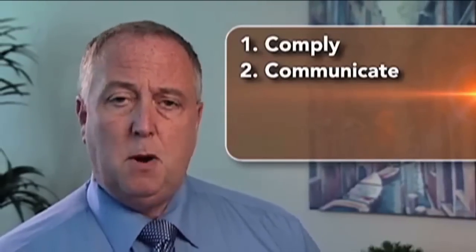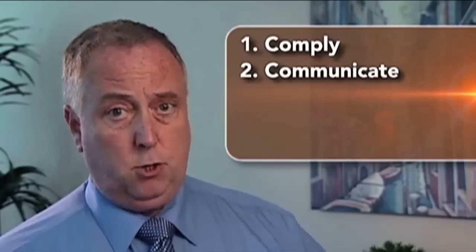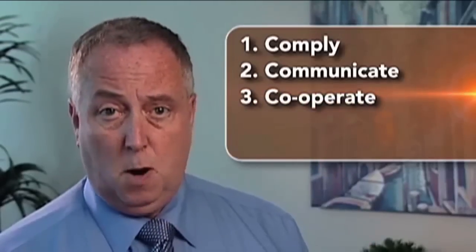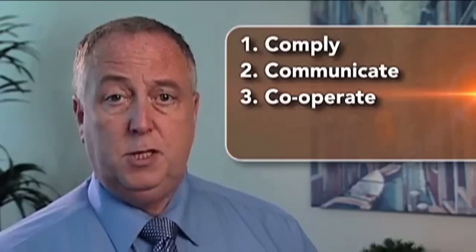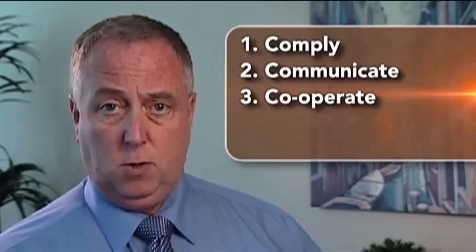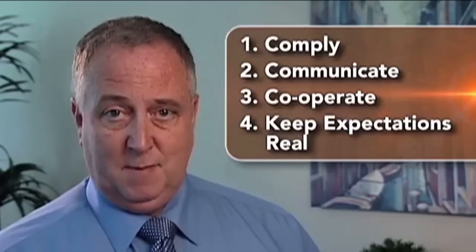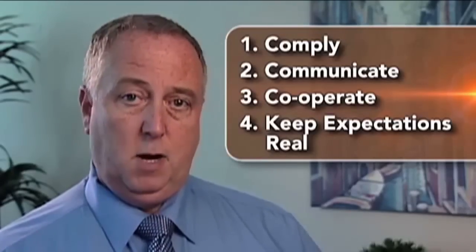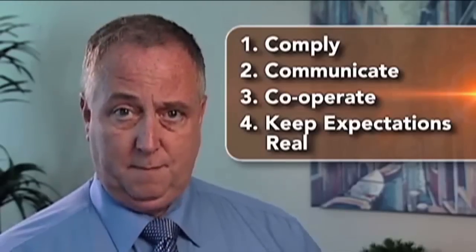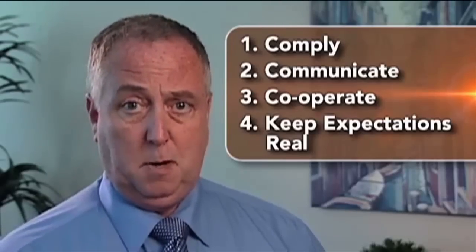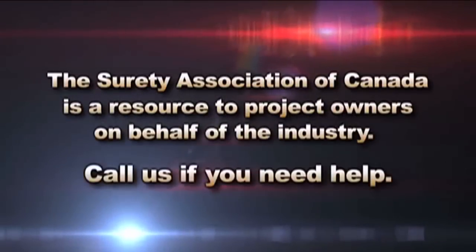Second, communicate: keep the bonding company informed of any issues as they arise and send out the default notice promptly. Third, cooperate: make sure the bonding company has access to your knowledgeable staff and the relevant contract documents — that's critical in determining what the obligation is. Finally, keep your expectations realistic. A bonding company can help you solve the problems that arise from a contractor default, but they can't make those problems completely disappear. If a job is eight months behind, it's not realistic to expect the bonding company to make up those eight months in just three weeks.